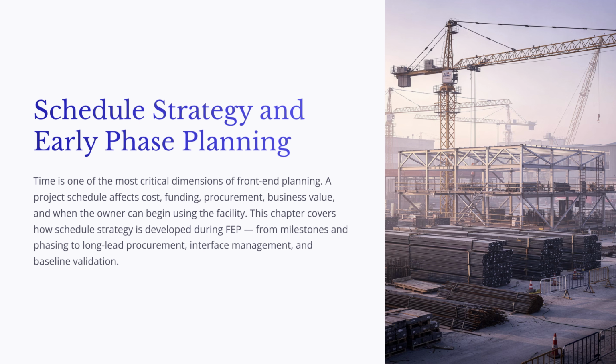But early schedules can also be dangerous when they are built on optimism rather than evidence. A reliable front-end schedule must reflect scope maturity, permitting, long lead procurement, construction sequencing, commissioning, and risk.